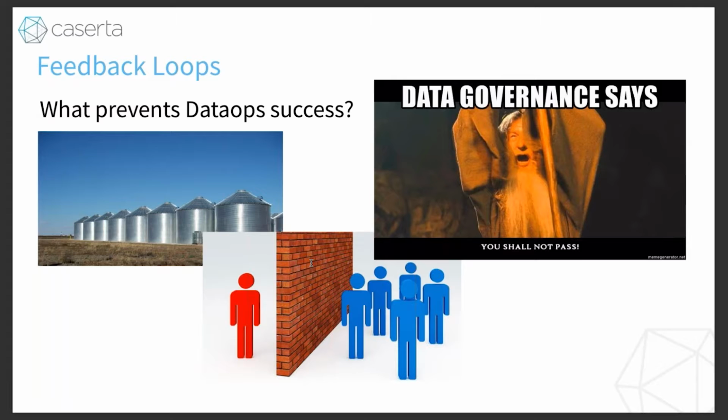Another thing that occurs is just people silos, not data silos, but people silos, where people are just on different pages. There's minimal crossover between the teams. Oftentimes they'll just throw a set of requirements over the wall and say, go implement this. It's really important to get all these teams interacting on a consistent basis, not necessarily meetings every day, but several meetings a week through the course of a project to share knowledge and learnings as they occur throughout the project.